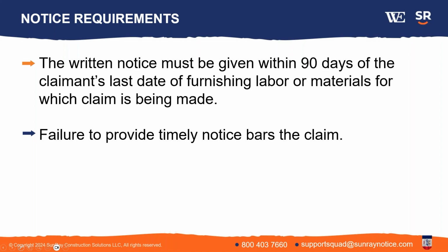I'm not going to get into the details of that. Just know that that can be an issue. And the reason it's important is because it can determine whether a notice is timely or not. Failure to provide the written timely notice bars the claim. So if the court determines that the written notice was required, but it wasn't timely given, the entire claim is barred. Next slide.